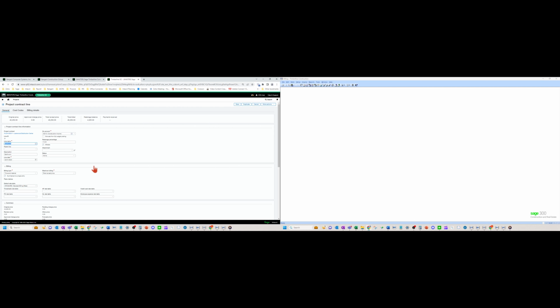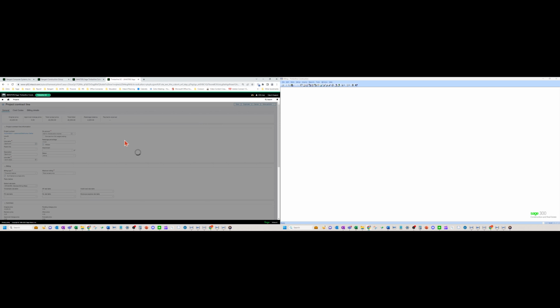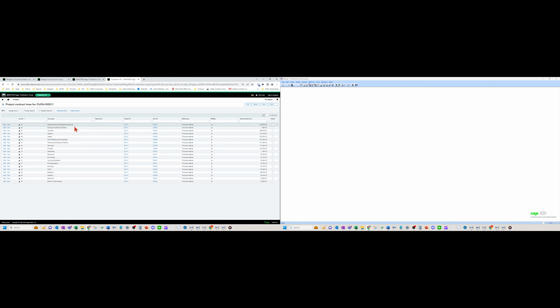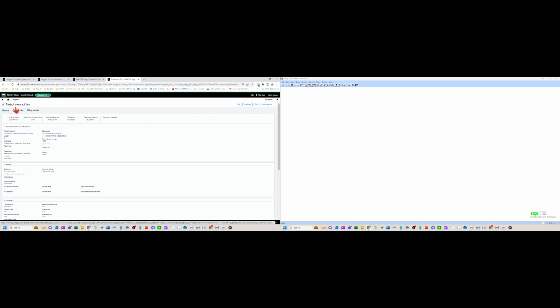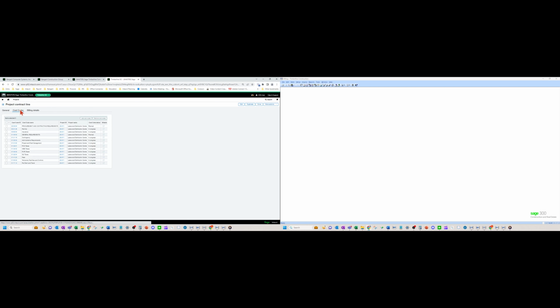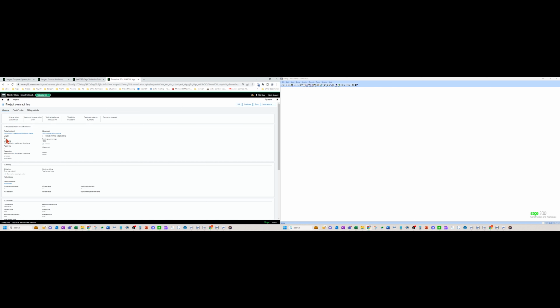So another thing I want to point out is on every line item, I've clicked the summarize to a single entry checkbox. So what that does is all of these line items here are going to have costs associated with them based on the cost code I have mapped to this contract line number 1. So all of the cost codes listed here, if I have an AP bill or labor or something coded to this cost code, for example, it's all going to group up here to 01 pre-construction and general conditions.